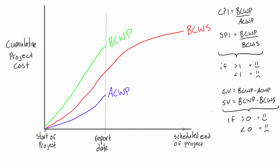For the variances, the reference point is zero instead of one. If the cost variance is greater than zero that means you are under budget, and if the schedule variance is greater than zero you are ahead of schedule. Conversely, a negative cost variance means you are over budget, and a negative schedule variance means you are behind schedule. We know all of this from previous videos on calculating CPI, SPI, and so on.